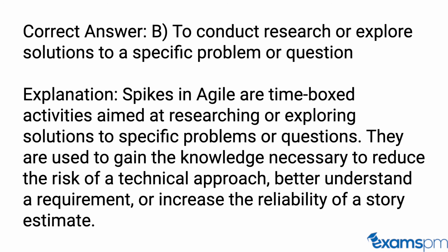Correct answer: B, to conduct research or explore solutions to a specific problem or question. Explanation: Spikes in Agile are time-boxed activities aimed at researching or exploring solutions to specific problems or questions. They are used to gain the knowledge necessary to reduce the risk of a technical approach, better understand a requirement, or increase the reliability of a story estimate.